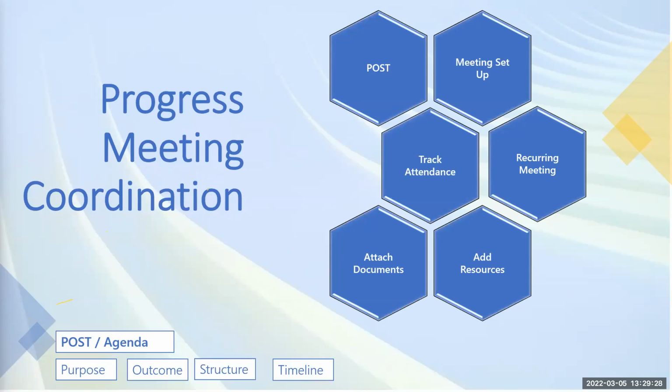You may not have a terms of reference. And in those instances, if you're not able to attend and you delegate someone to attend on your behalf, that's fine. It means the person knows enough to be able to contribute and add value for us to move on. But for regular governance meetings, like the CAB that Mary talked about, for steering group meetings or SteerCo, whatever word you call it, or project board, program board, those sort of boards will have terms of reference. Certain key positions have to be there, and if they're not going to be there, they delegate people to attend on their behalf.